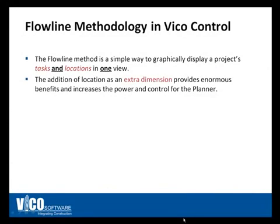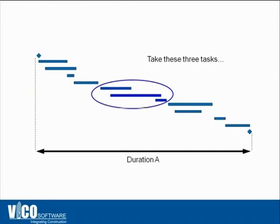Line of balance really means the ability to graphically display tasks and locations in one simple view, as opposed to just an activity-based schedule where locations aren't represented automatically. Having locations added as an additional dimension provides a lot of benefit — it increases the planner's control, creates a deeper understanding of the relationship between tasks, and allows the planner to see what's going on in the schedule at a glance rather than spending time investigating multiple pages of printouts.